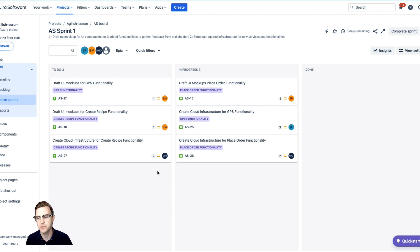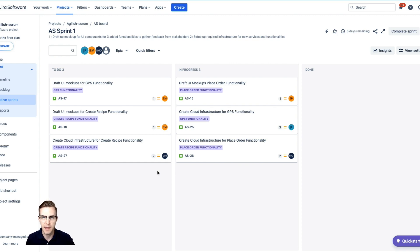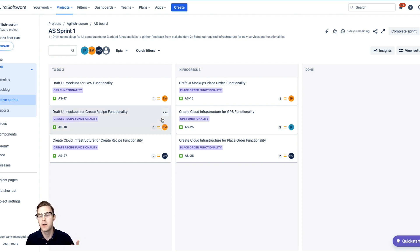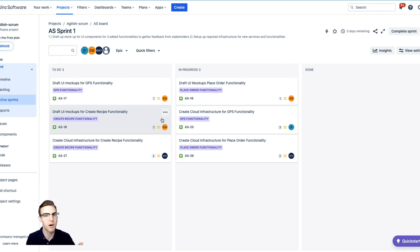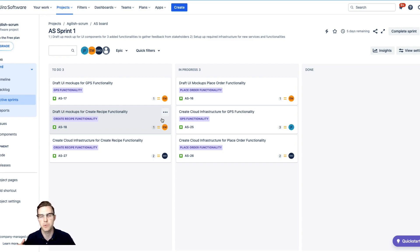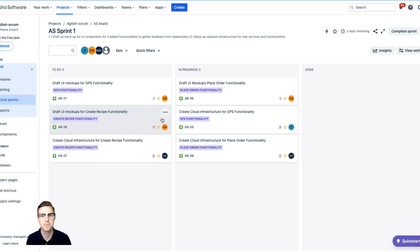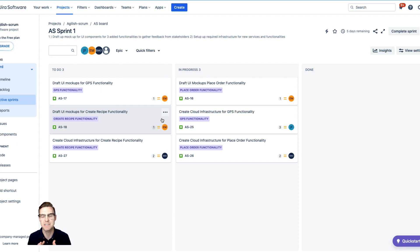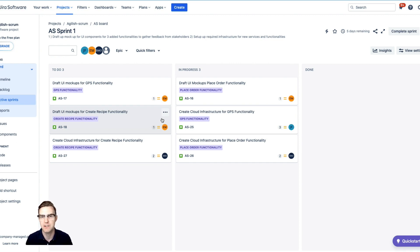So the last tip and big tip and trick for the daily standup as a scrum master or a leader is to actually pause that discussion. Say: Hey, sorry Emily and Joe, I understand this is an important topic. Let's actually table that to after daily standup discussion or a parking lot. Some people have seen before, and making sure that the rest of us can go through and communicate and they can get out and get back to what they're going to accomplish in the sprint. So important parking lot discussions to keep that into 15 minutes, only hold the people that you need to, because it adds up. Five minutes from five people, that's 25 extra minutes.